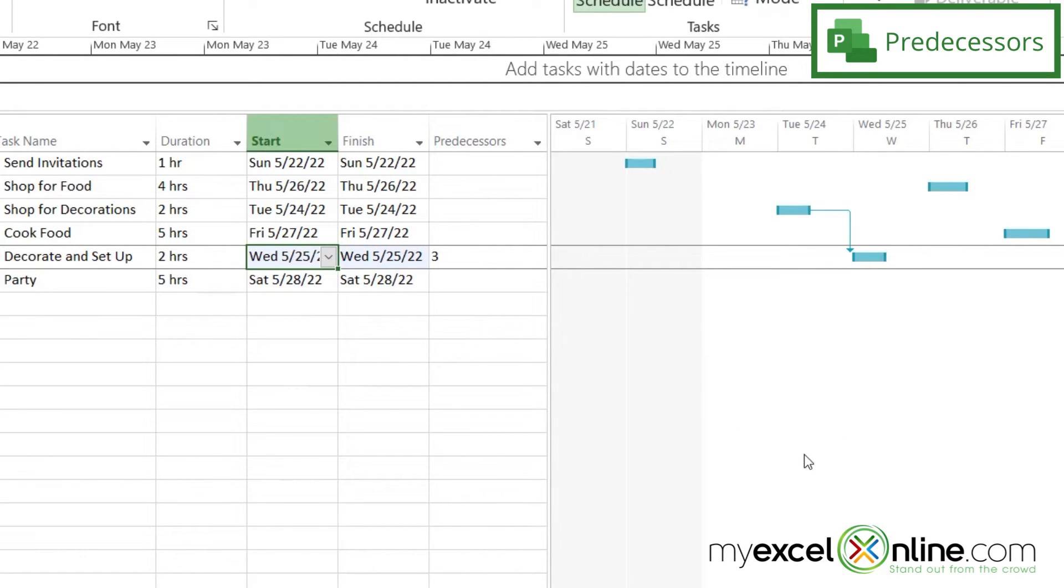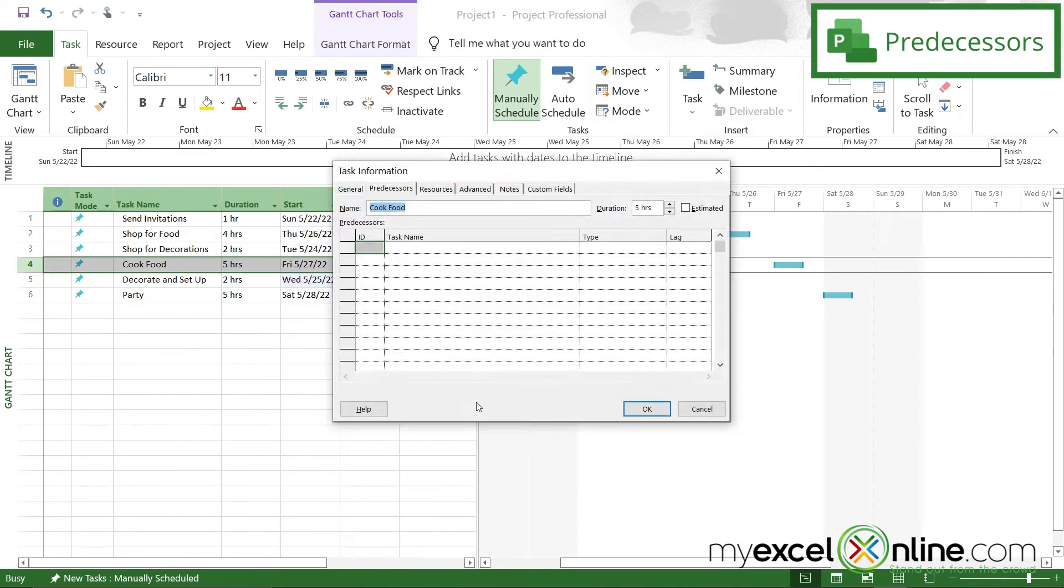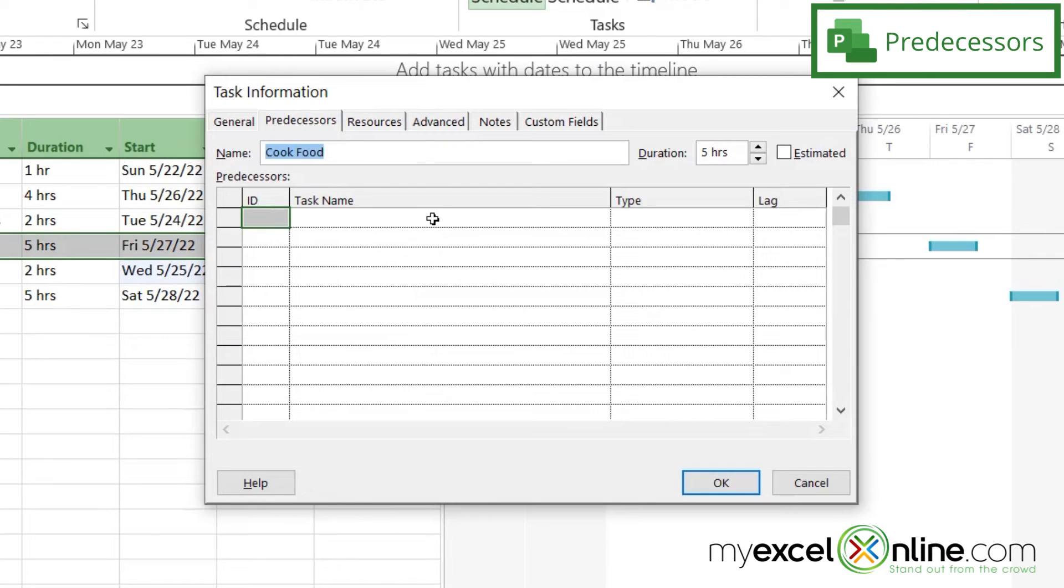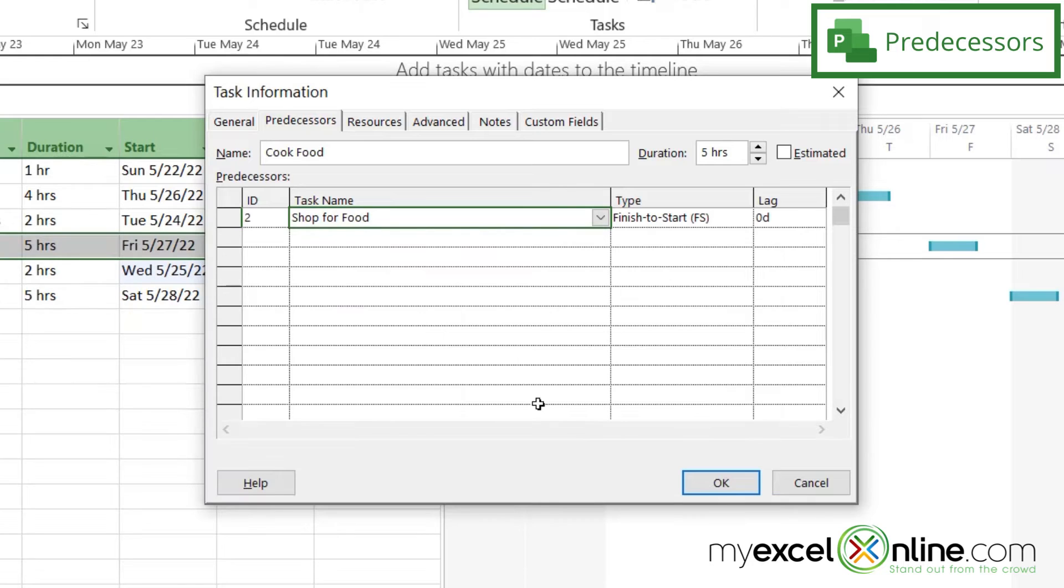But there's another task here that has to happen before the other, and that would be cook food. I would need to shop for the food before I cooked it. So I'm going to double click on cook food, go to the task and change that to shop for food and say okay.